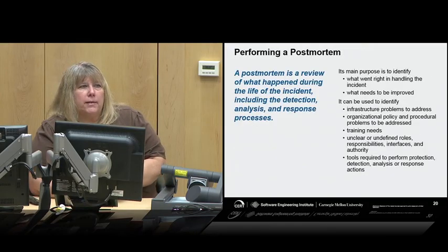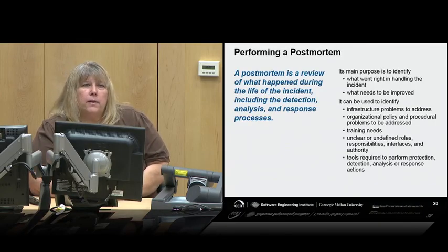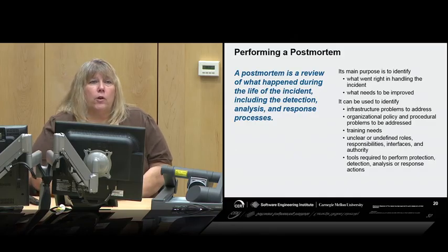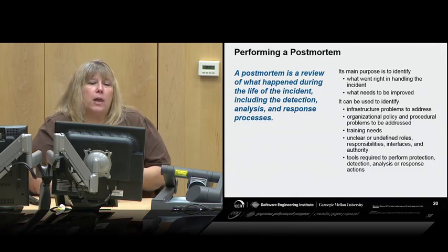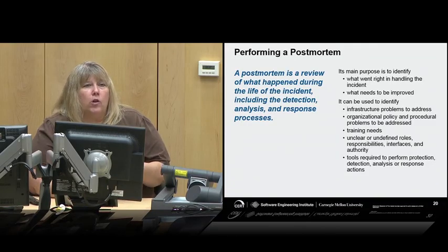So there's some other best practices as we move through the response process and sub-process. Once response has been executed, a good recommendation is to conduct a post-mortem, or some people call it an after-action report. Hot wash is another name that we've heard used. So basically, it's pulling in all the key players and reviewing what happened during the life of that particular incident. We look at from detection through the triage and analysis and response processes, what was done, what were the problems that were encountered, where things went well, and when things didn't go well.